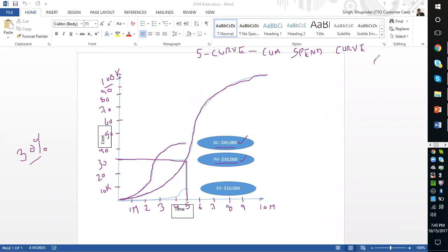The same example which we quoted earlier, let's say A, B, C, D. If these 4 tasks have to be completed to complete the project, and each task is of the same duration, then if you have completed activity A or task A, then you have completed 25% of the project. If you have completed half of B, then 25% plus 12.5%. That's how you can find it out, right? It's not too difficult to find out how much percentage of the work you have completed on the project.